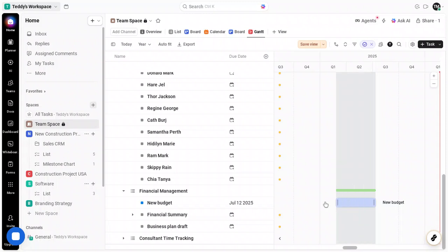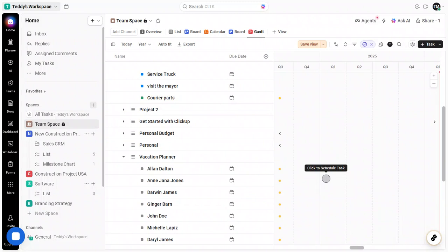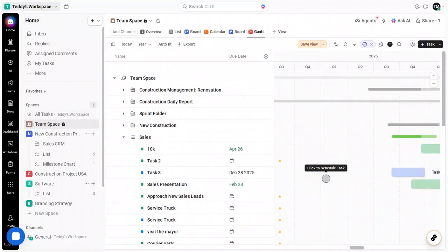Once you've started placing tasks on the timeline, you'll get very comfortable with dragging the bars themselves. It's the fastest way to nudge a task forward a day, extend its duration if you've underestimated the effort, or pull something in earlier when a dependency wraps up sooner than expected. If you realize two tasks overlap and share the same person or resource, you can separate them with a quick drag to remove the conflict. The Gantt view is designed for this kind of real-time adjustment and shines in planning meetings, where change is constant and immediacy matters.